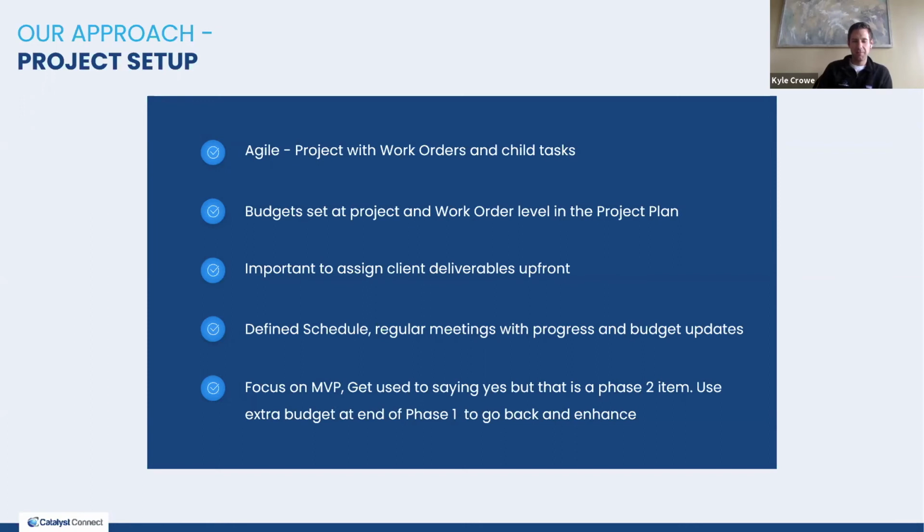So what we like to do is try to understand the client goals on a project. What do they want to get out of Zoho at the end of the day? And we try to build out different options. So it kind of goes back to your parachute point, John Mark, but we usually have a number of different ways we can go about solving a client use case. And ideally, we're able to implement the best case scenario, but sometimes things take longer than they should. We run into hurdles and complexities, and we don't have time to build out the best case scenario. So we like to have options and present these options to our client. And if they do need to stay within their budget, we have an option to stay within the budget and still accomplish their use case within Zoho.